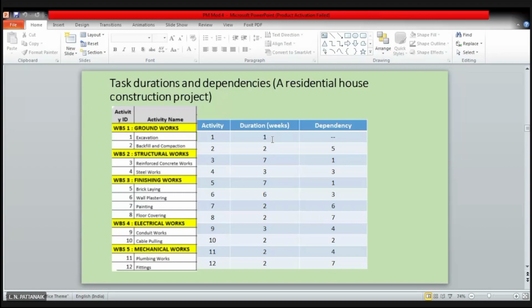For example, instead of weeks, you can write days. No harm. You can write days, but then you have to write 7 days here, 14 days, and then 21 days, like that. If you find the activities are being completed not in weeks but in days, it's better to use day units, of course. That is the unit of scale that you will use on the x-axis of the Gantt chart that you are going to prepare. So in this case, it is weeks.